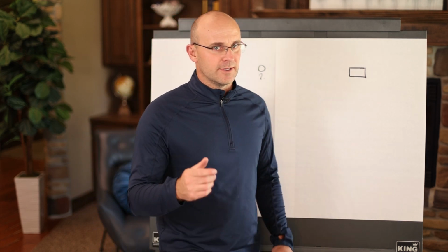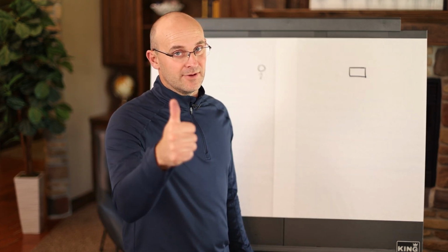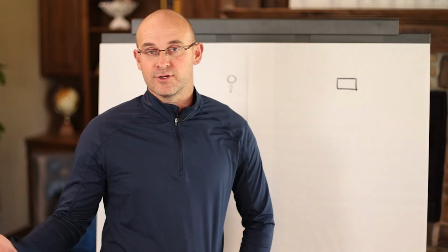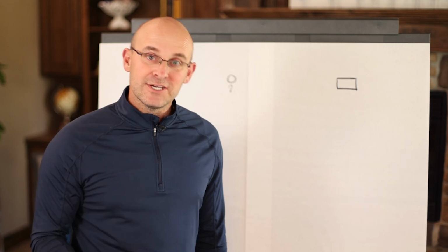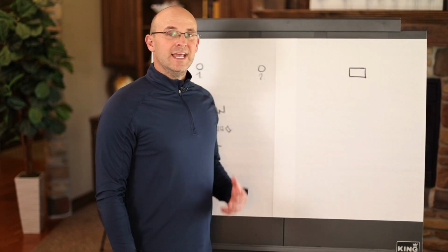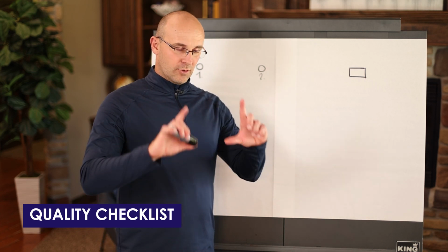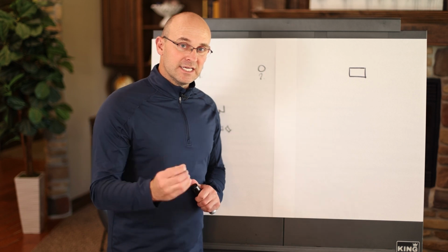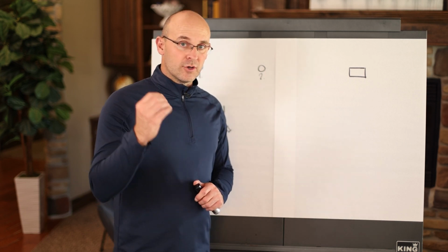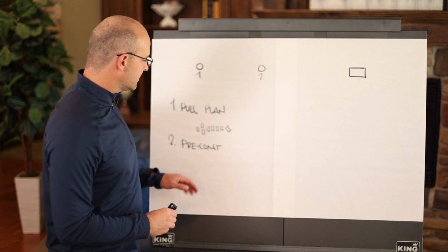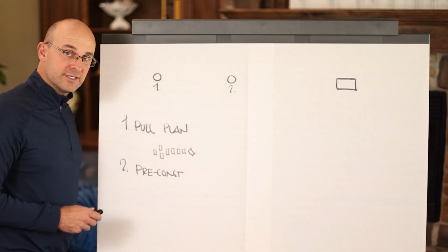And if I'm a crew leader, I'd be like, so if I do this, you're happy, right? That takes the burden off of you having to guess, or the crew leader having to guess, and there are clear expectations. The other thing that comes out of that meeting 3 weeks ahead, 2 weeks ahead, is a quality checklist or visual feature of work board, meaning it is a clear quality checklist or quality visual board that shows exactly what the crew leader should be installing based on the pre-construction meeting.